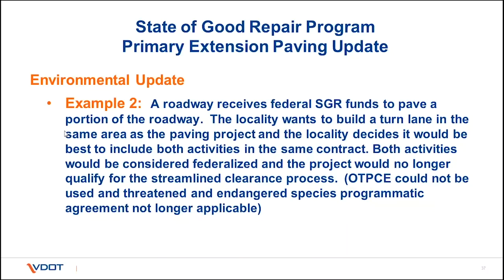So you need to make sure you work with your local liaison to incorporate those activities. In future applications, we'll include in the SMART portal a way for you to indicate whether or not you want VDOT to do the NEPA document. But for this cycle, if you coordinate with your local liaison early on, prior to submitting your application, that would be beneficial.